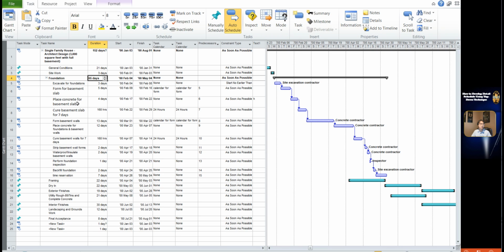I would like to give additional tips, but the detail will be provided in a later tutorial. If you enter the duration in a summary task, the task mode automatically becomes manual schedule. It means this schedule is not the result of schedule calculation, and it is imposed by you. Project respects any dates and durations you imposed, and will not change them, even if you make changes to a subtask under the summary task.